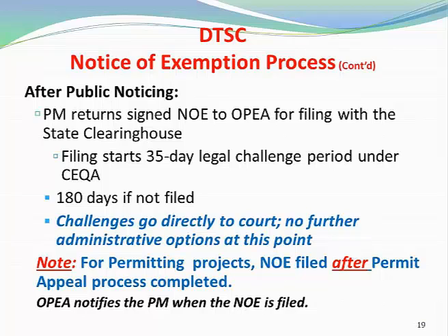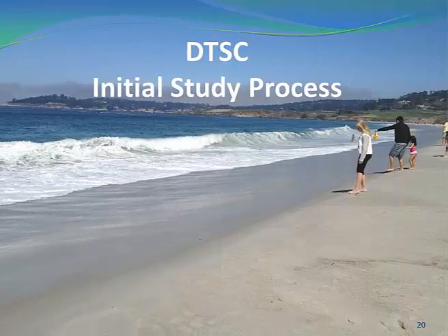Because if the NOE is not filed, the CEQA challenge period extends to 180 days from the date of project approval. Our office notifies you when the NOE has been filed by electronic and hard copy.